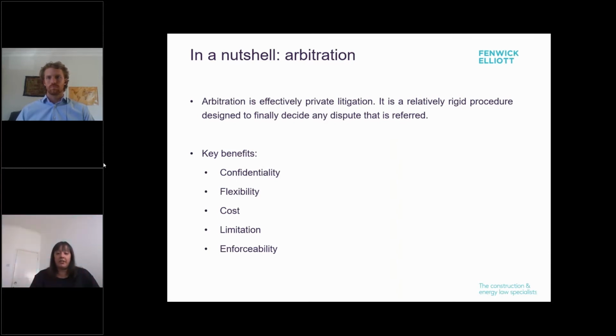This expedited procedure aims to provide the parties with an award 6 months from the date of the first CMC. A normal arbitration process would, in most cases, exceed the time and cost of a dispute board process. Another factor is limitation. As with issuing a claim in court, issuing a notice of arbitration stops limitation running. The same cannot be said for the DB process.